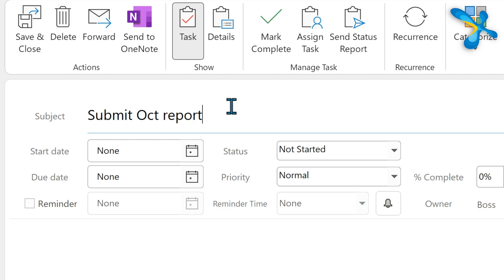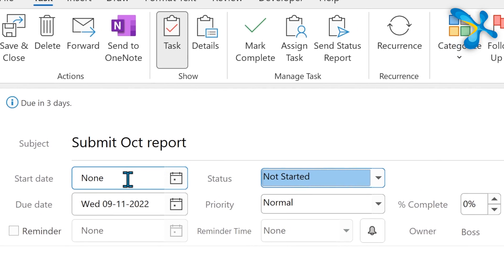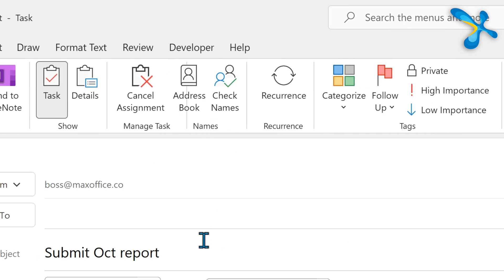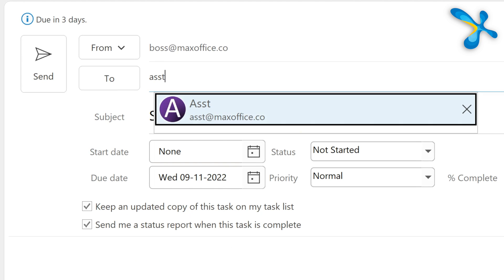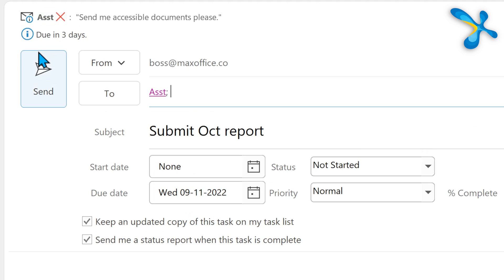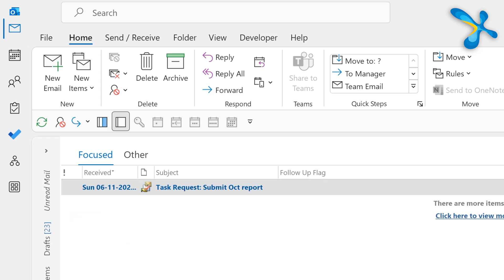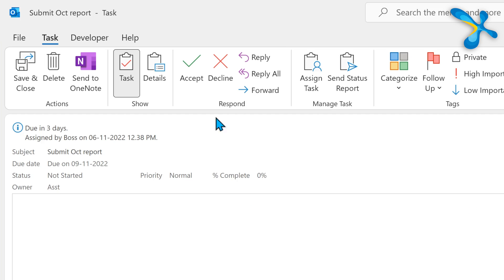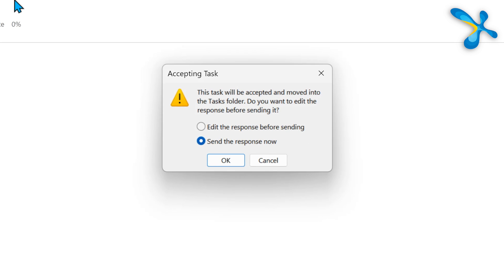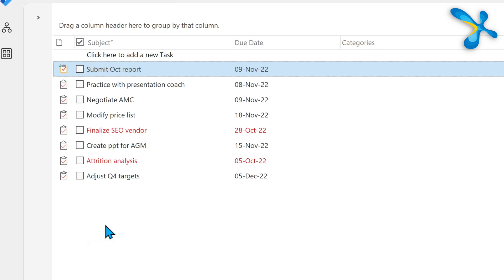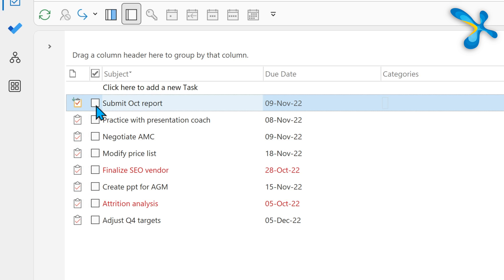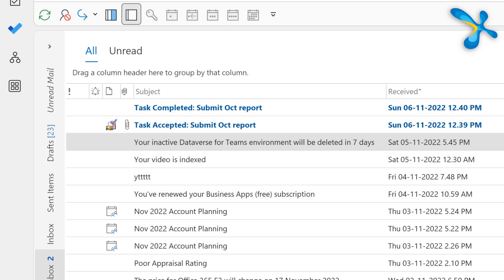Put the task, set the deadline, click on the Assign Task button, and enter the name of the person — in this case, the assistant. Send it. Now it becomes that person's task. That person won't get a mail; they'll get a task request — accept or decline. When the assistant accepts, it goes into their task folder automatically. When they mark it as complete, you will be notified.